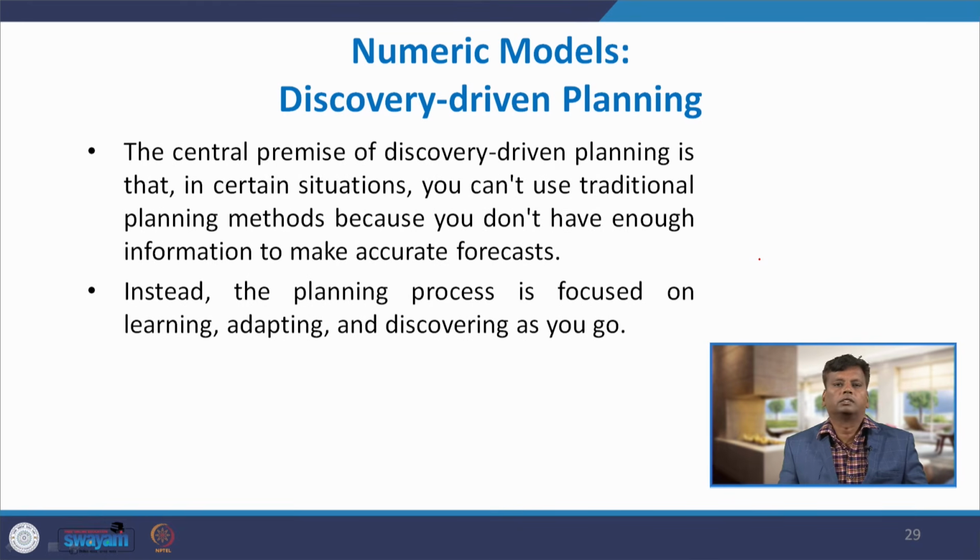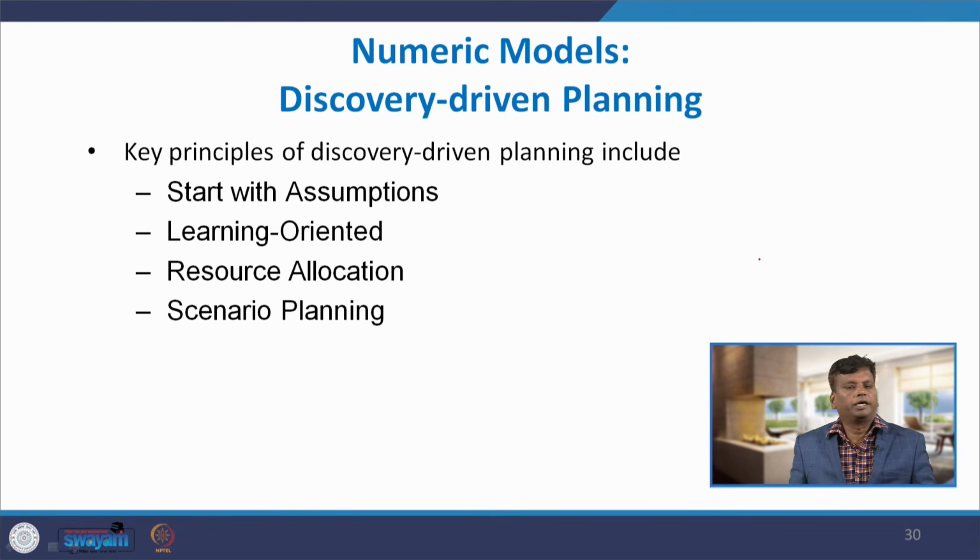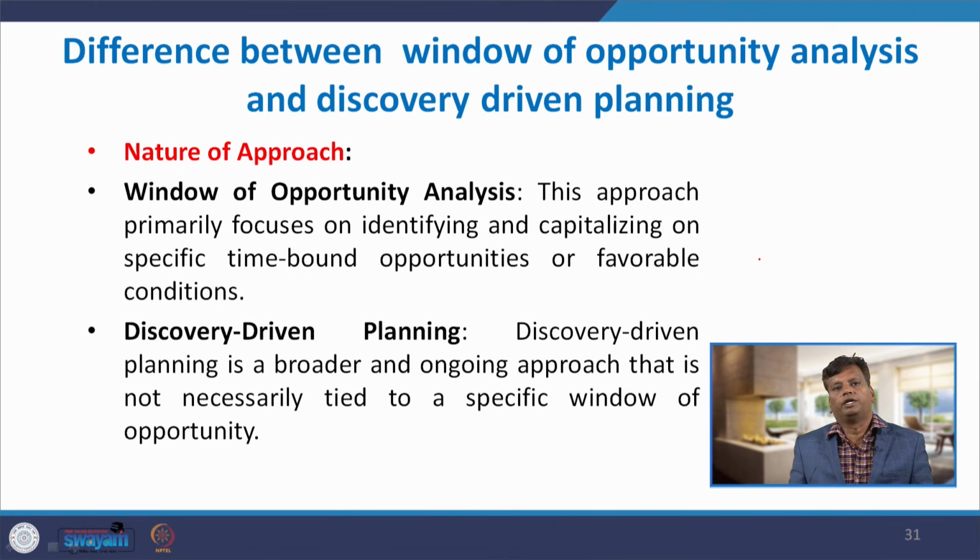The central premise of discovery driven planning is that in certain situations you cannot use traditional planning methods, because you do not have enough information to make accurate forecasts. Instead, the planning process is focused on learning, adapting and discovering as you go. The key principles of discovery driven planning include starting with assumptions, then learning, then resource allocation, then scenario planning.